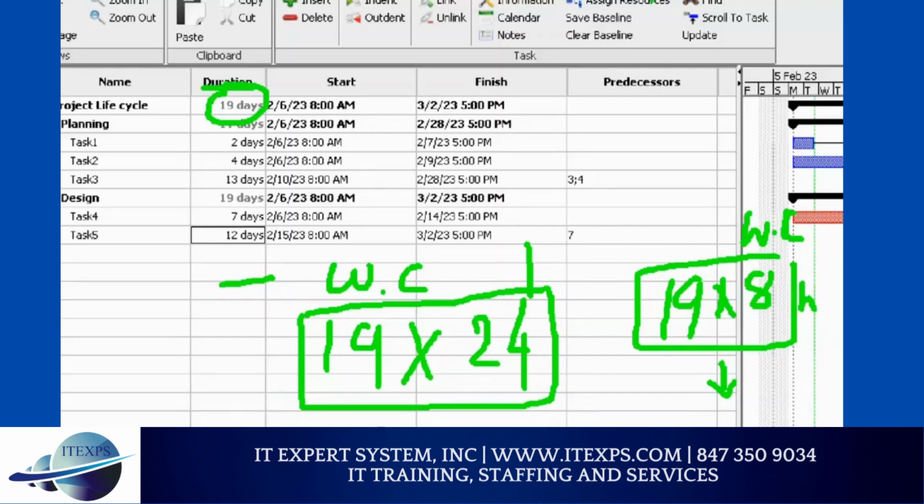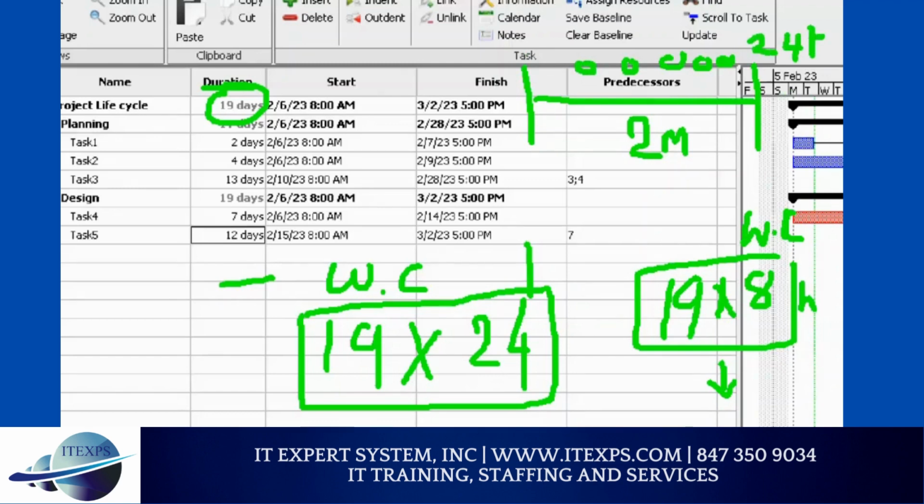So for example, if somebody asks how many weeks this BA will take, I say 2 months. It looks like 2 months, but if I say you're coming 8 weeks and 3 hours each week, so total 24 hours, you can see 24 hours gives me more clarity, but duration also gives me longevity, right? So both are important, but only one doesn't give me any clue. Make sense or not? So 2 months is a duration, but 24 hours is effort.